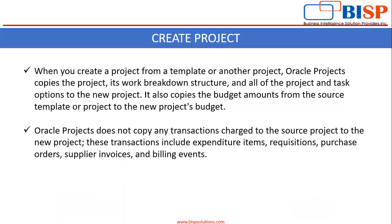When you create a project from a template or another project, Oracle Projects copies the project and its work breakdown structure, and all of the project and task options to the new project. It also copies the budget amounts from the source template or project to the new project's budget. Oracle Projects does not copy any transactions charged to the source project to the new project.